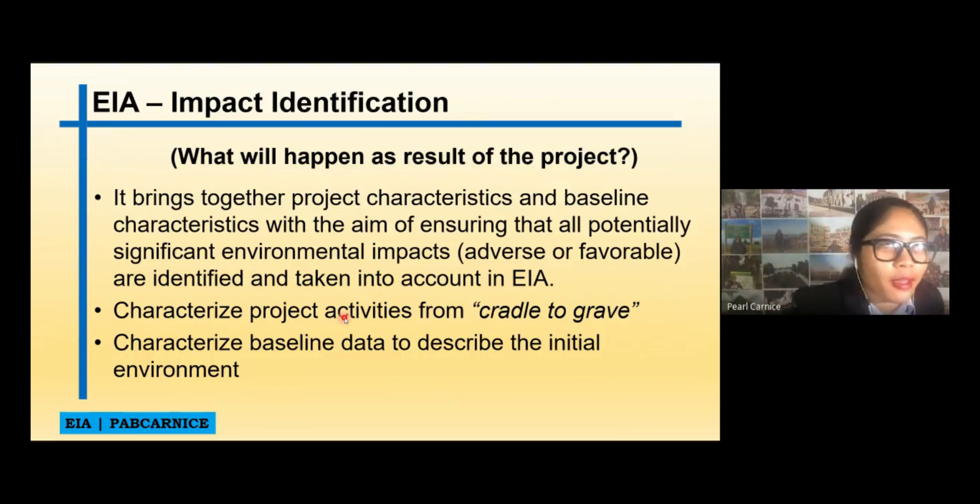Because, of course, it will be hard to predict the impact if we do not know exactly what is the initial environmental status of the area that we will be doing our projects. That is why the baseline data is very important with your EIS study. Because it will be the reference point of your impacts, of your impact predictions. At the same time, there is actually no such thing as EIS study or EIS document that has no baseline studies or information. Because, again, that is the reference point.